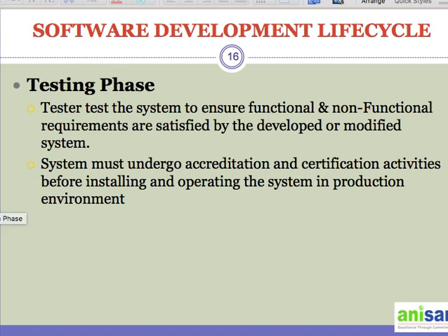Okay, in the testing phase, basically, the business analyst will monitor the testing activities. They will be part of all the testing meetings, and they will also review the number of bugs and issues identified, the number of issues fixed, and whether there are any serious problems. If there is nothing serious, then they can let the testing go to the next level. If there are any issues, they have to report back to the stakeholders and keep them informed how the testing is going, what the overall quality of the solution is, what they should expect, and how things should go. If there are any delays, those also need to be communicated. Okay, and then they actively conduct the UAT with the users and document the UAT feedback and reviews, and that will also be presented. Okay, so this is your testing phase.